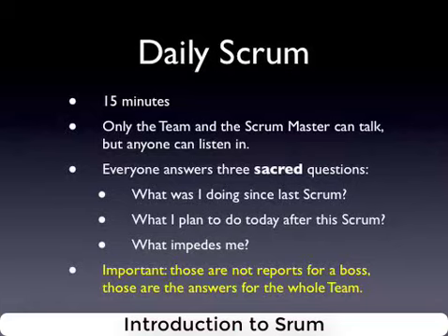And my impediment might probably be that maybe I don't know Microsoft SQL that well and I would need some help on that. The Scrum Master, who usually leads that meeting, has to listen into that, and then after this meeting closes, maybe start up a discussion about the problems or about some technical details that surfaced during this meeting. Part of that meeting is updating the estimates on tasks.